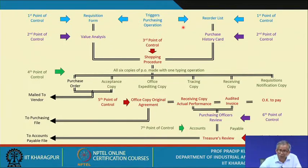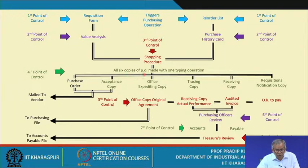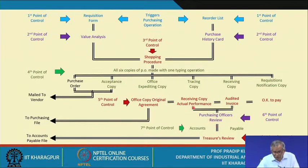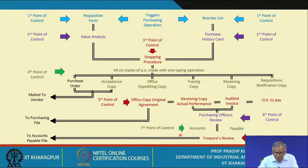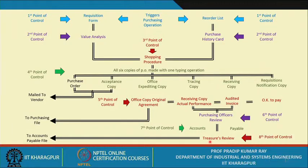The first point of control and the second — which is the value analysis part — and the third is the shopping procedures. At the fourth point of control, you determine how many copies of purchase orders you will send to different departments. The fifth control point is when you as purchasing officer review all copies of the purchase orders. The sixth and seventh control points involve the accounts department determining what is payable and what is not, and at the eighth point of control is the treasurer's review.